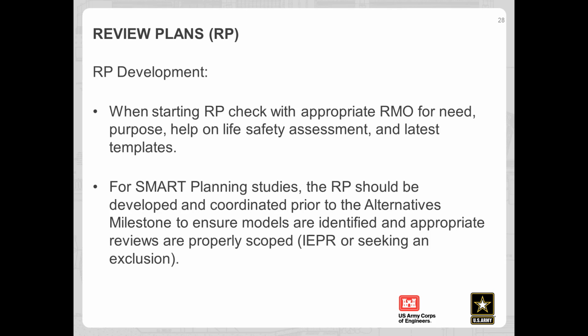So when you're starting your review plan, you want to check with your RMO. Make sure you know who that is. You can get help on the life safety assessment, the latest templates. Generally speaking, you're going to be working with a planning center of expertise, but the RMC is also RMO for dam or levee safety studies where there's modifications being done, and also if there is a significant life safety concern, then the RMC will be your RMO. And again, as I mentioned earlier, for design of and products associated with Inland Nav, it will be the Inland Nav NCX, and then the Inland Design Center. And then our MSCs can also be the RMO, often for your CAP projects, things like that.